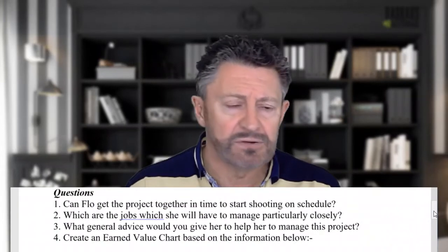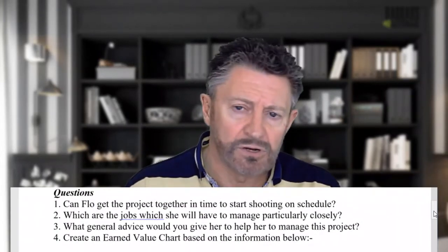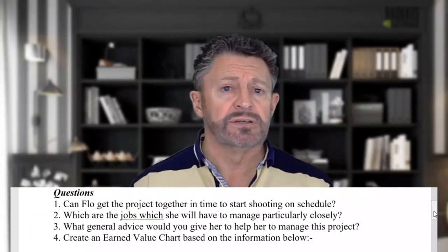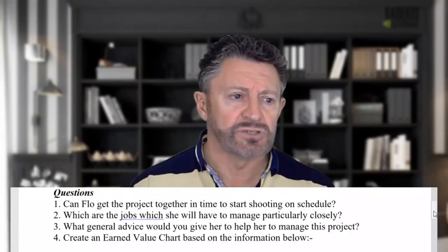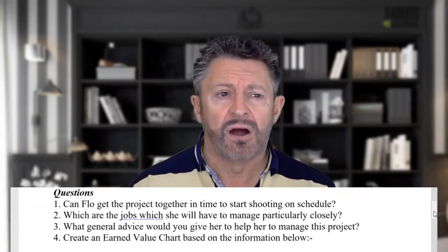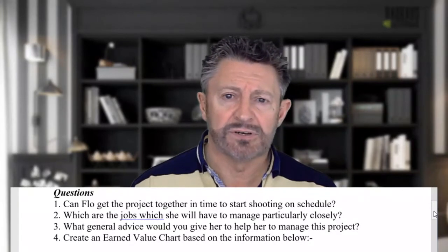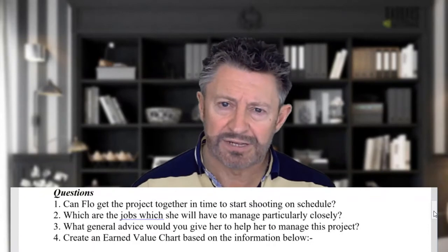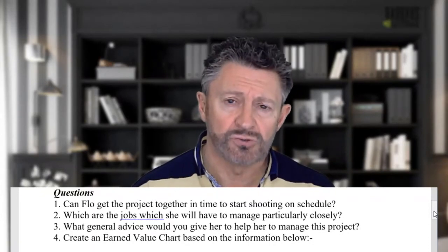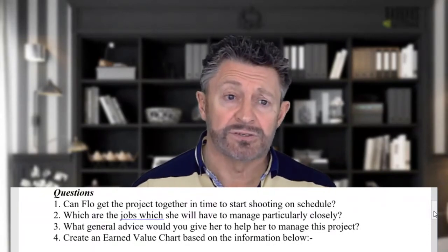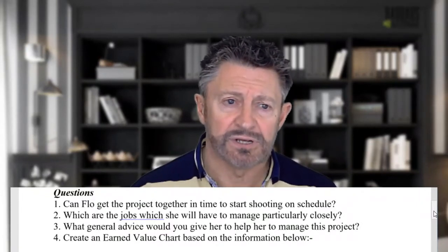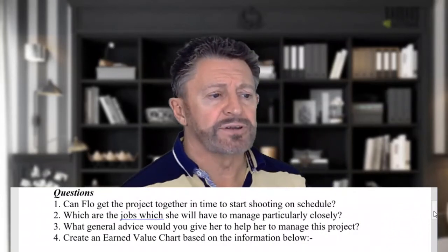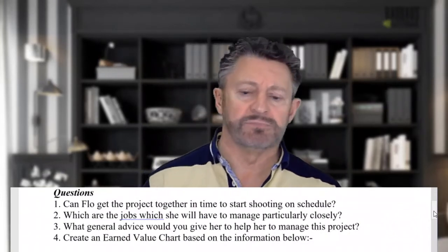And if someone said no, we just heard word that they're not coming on Thursday evening, they won't be here until next Tuesday, straight away you could take action and say, well, what's happening? Is there something we can do to keep us going until Tuesday? Or phone the company and get them to deliver one van at least, and then we can work on the others the following week according to schedule. So that's how you're using the monitoring and control mechanisms to track what's happening in the projects and to remove any potential delays. And then finally, create an earned value chart based on the information below.